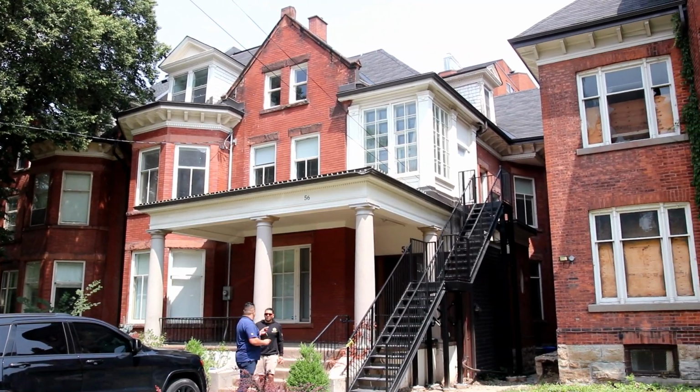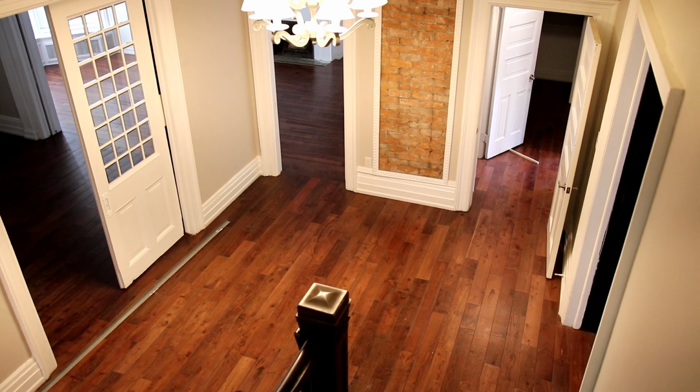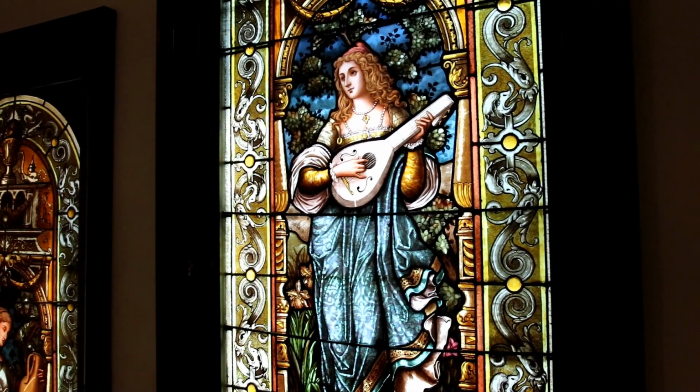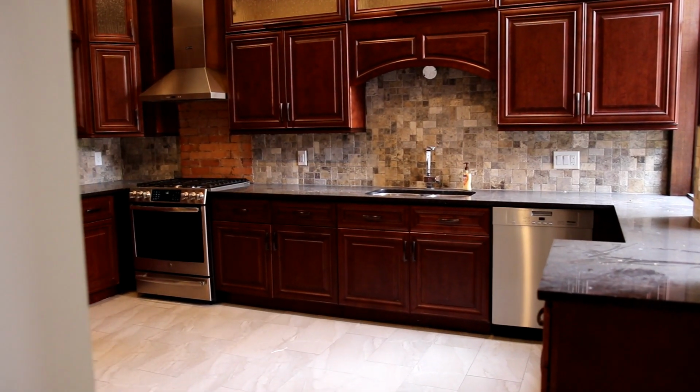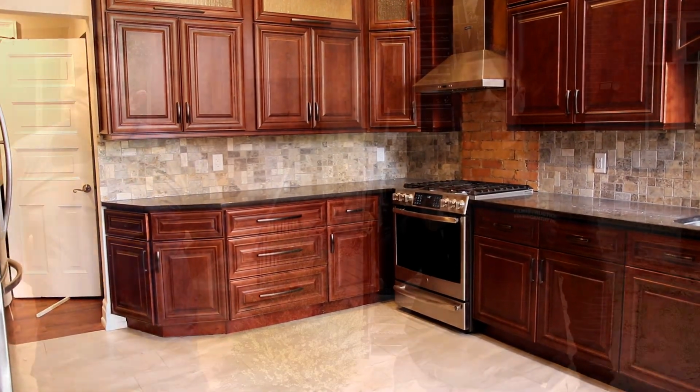Yeah, so this is another project that we're working on. We collaborated with Abdellah and his clients on the front end of this. This one is very interesting because it has a heritage designation on it, which, if you've ever done a project with that type of designation, is definitely a lot more red tape. You need to get permission for what you can construct inside and on the exterior of the building, but we got to the finish line and got our permit in place. Luckily our engineer was on the ball.